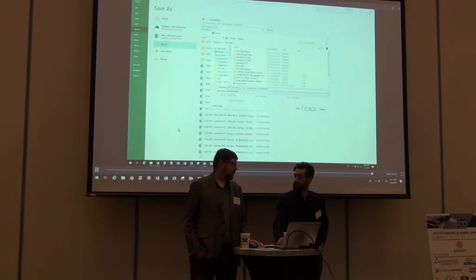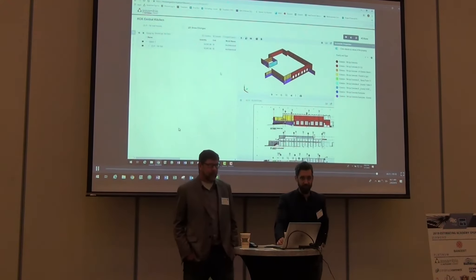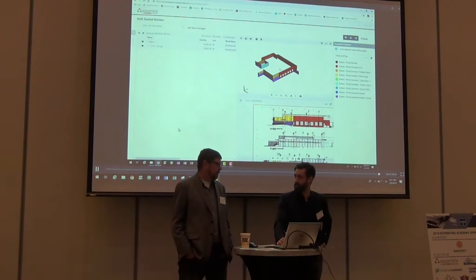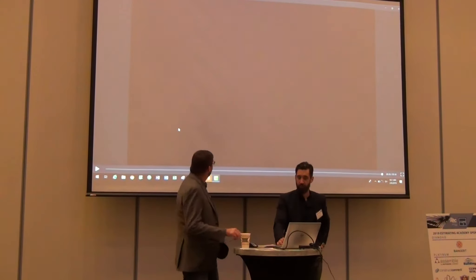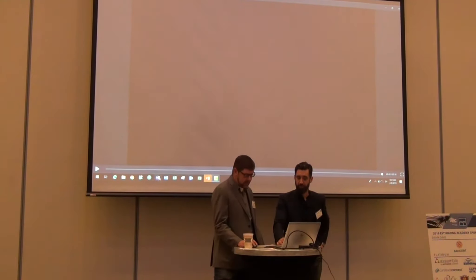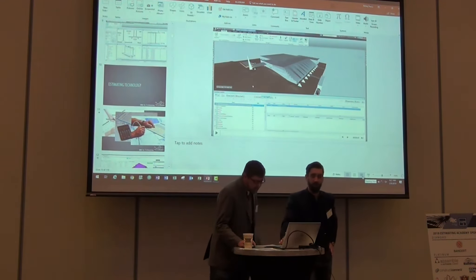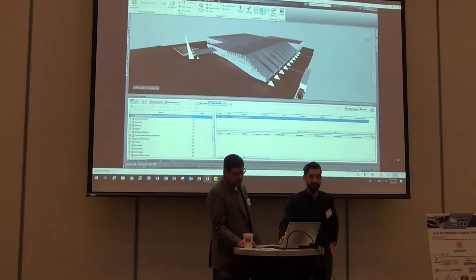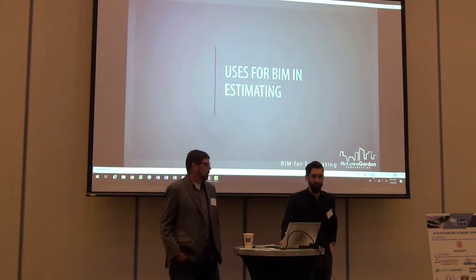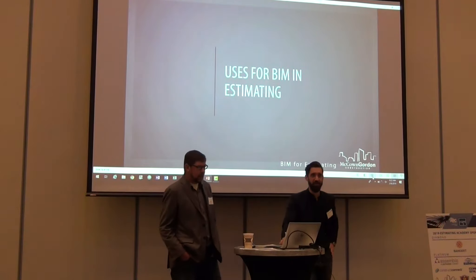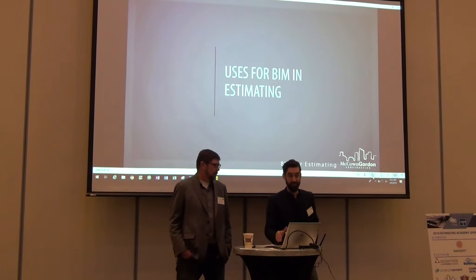It's still the job of a seasoned estimator to figure out what those numbers actually mean in terms of construction cost. One key thing to note — this is not a contract document. You can't just trust the model. It's tempting to look at the square footage outputs and say there's 10,000 square feet of concrete and we're done with the estimate. But you still have to do the page flip and use industry knowledge to verify the model is even accurate.